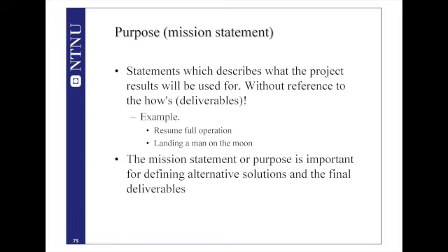I have an example. I will show this example on the next slide. It's a real case study where the main purpose of the project was to introduce a software solution, a combination of software and hardware, and the main purpose was to ensure accurate reporting of the runway status in Norwegian airports.